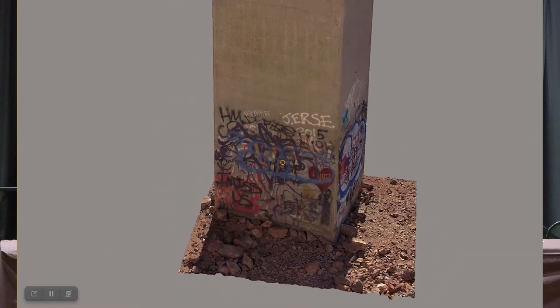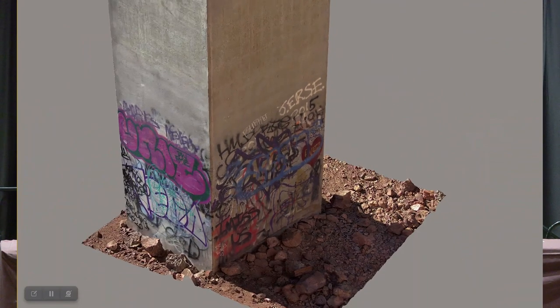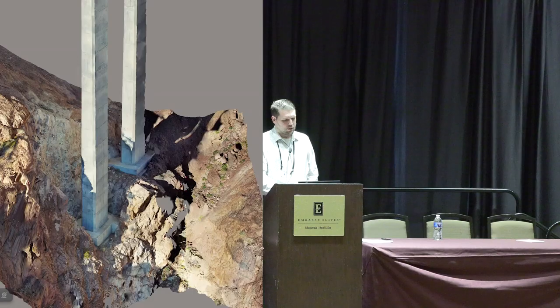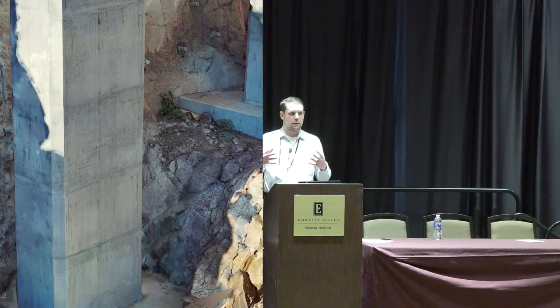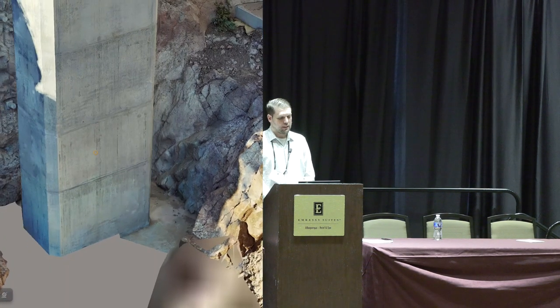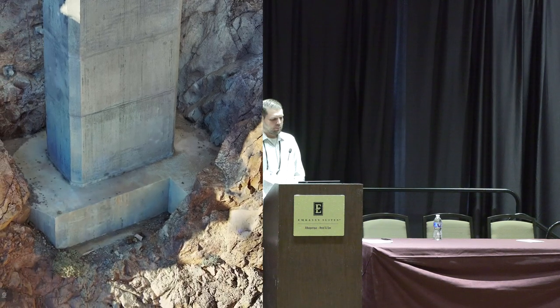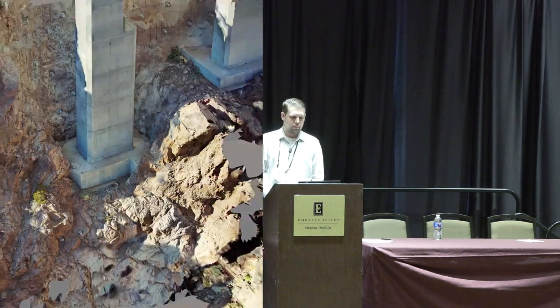In a total of an hour and 30 minutes, you're able to zoom in and get rather close detail of cracks, spalls, or other defects. With 30 minutes of flight time and an hour of post-processing, if you have a standalone machine in the field, you can process this directly during the inspection. If there are issues, you can then deploy a climbing team or other means. You need to understand how far away the drone needs to be and what type of camera you're using in order to see the defects. Here's an Ocala and Tillman column — zooming in, we're hoping to see enough detail to find cracks, measure crack width, and take measurements right in the field.